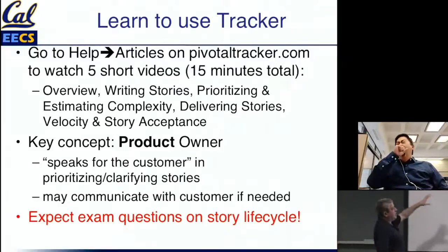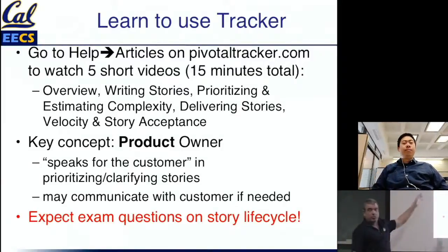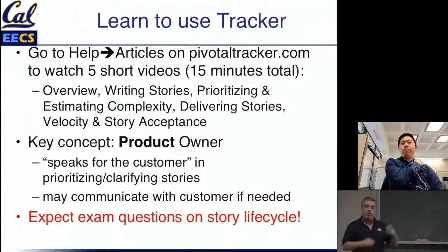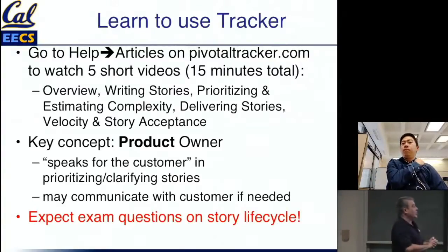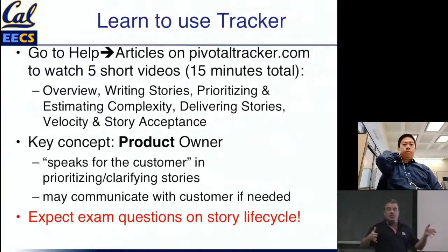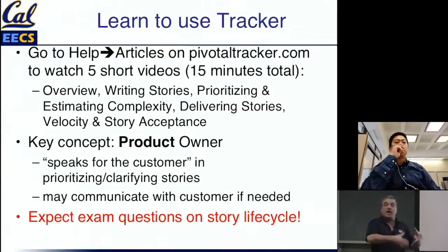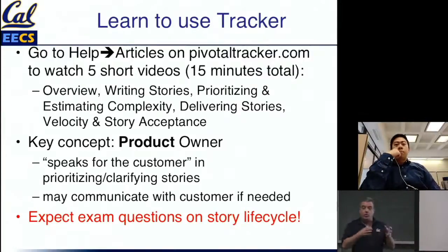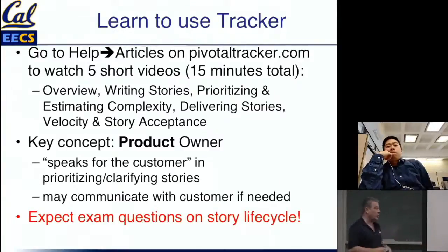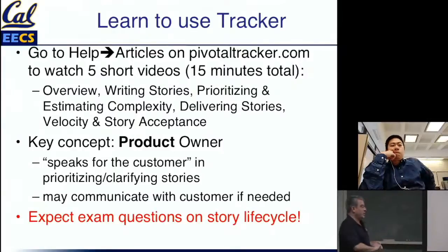One of the key concepts they don't necessarily talk about as much, but we will implement for your teams, is that for each iteration, there will be a designated person on the team who is the voice of the customer. So if you're in the team meeting, you need to make a decision, the customer is not in the room with you, there's someone whose job it is to basically try to behave the way the customer would have behaved. And we'll try to arrange it so that you get to rotate that role and different people have a chance to do it.